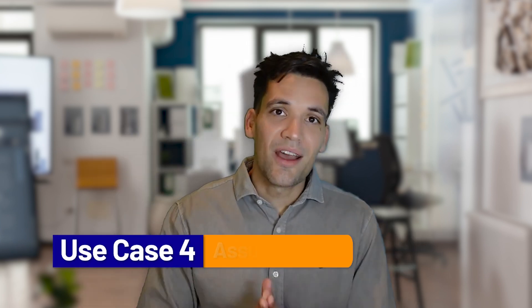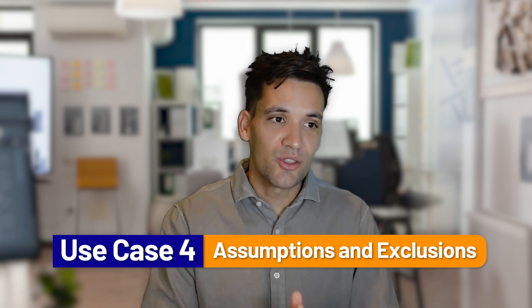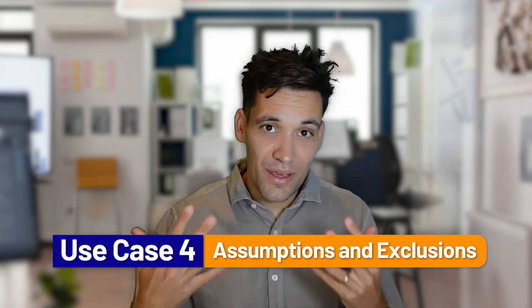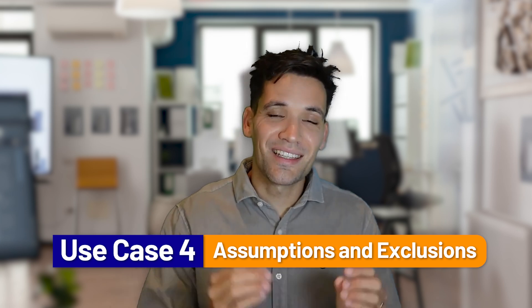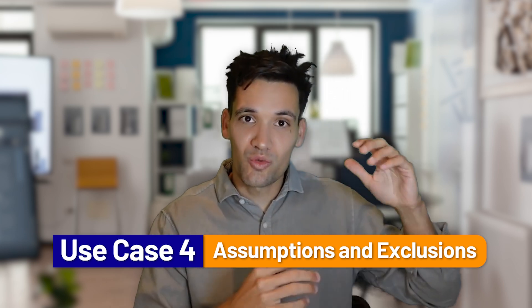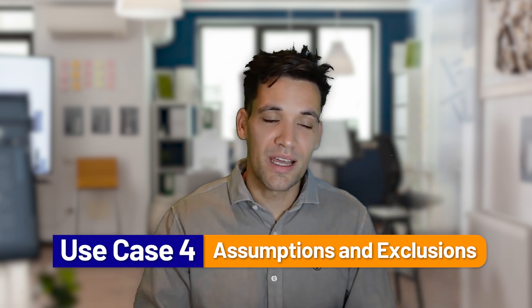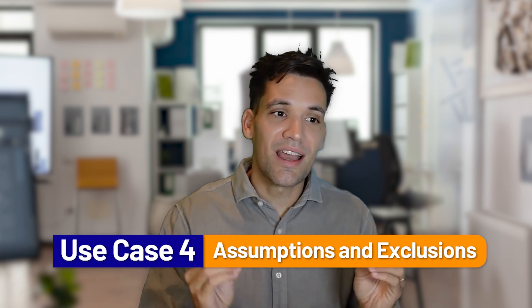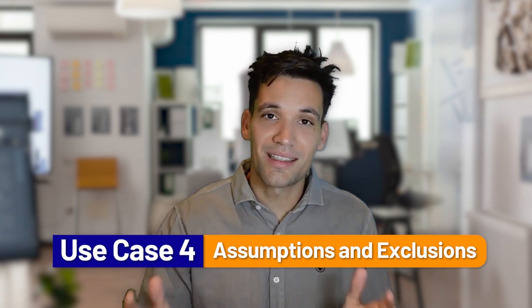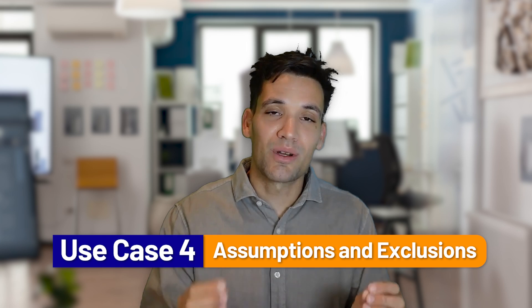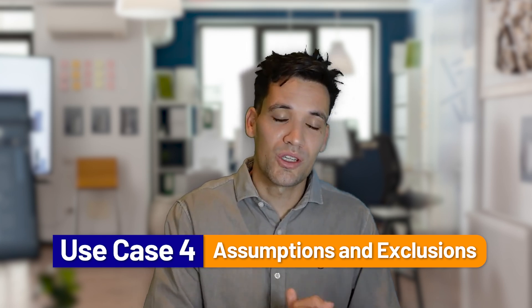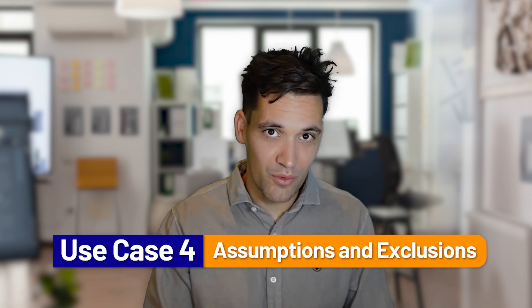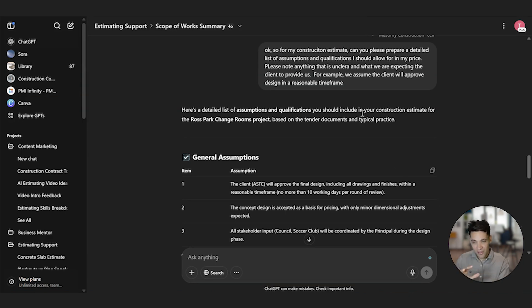Use case number four is helping you prepare your assumptions and exclusions. AI is great at just dumping in a whole lot of information and thoughts and getting it to order them. So as you're preparing your estimate, you can just register all your qualifications and assumptions, note them down as you're going, and upload these to ChatGPT and say, help prepare my detailed letter of offer and assumptions and exclusions list, break down everything I should exclude if I haven't thought of all the exclusions. So when you actually submit your bid, it can be crystal clear what you've allowed for.